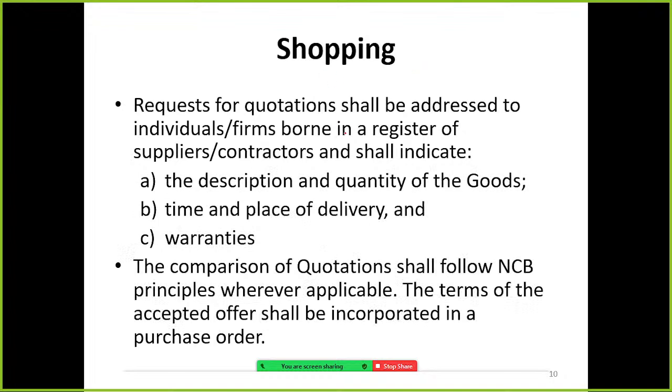Request for quotation shall be addressed to the individuals or firms born in the register of suppliers or contractors and shall indicate the description and quantity of the goods, time and place of delivery, and warranties. The comparison of quotations shall follow national competitive bidding principles wherever applicable. The terms of the accepted offer shall be incorporated in a purchase order.